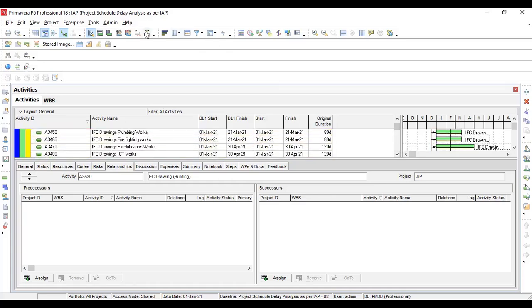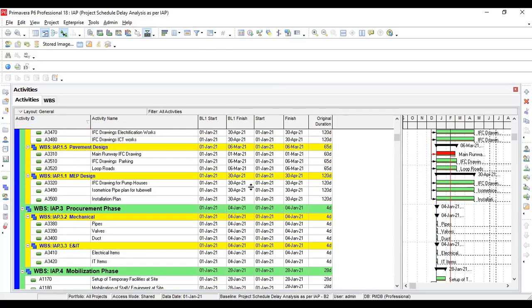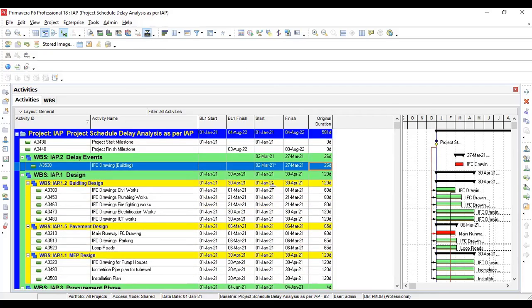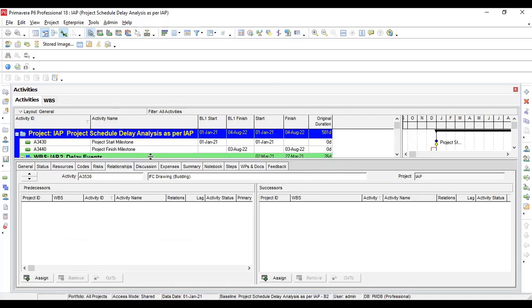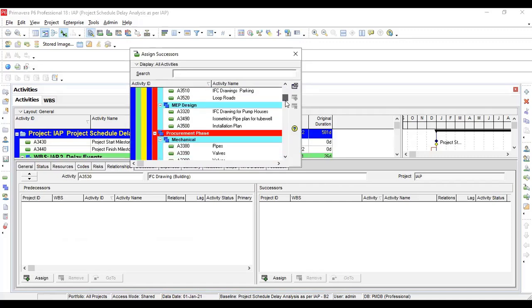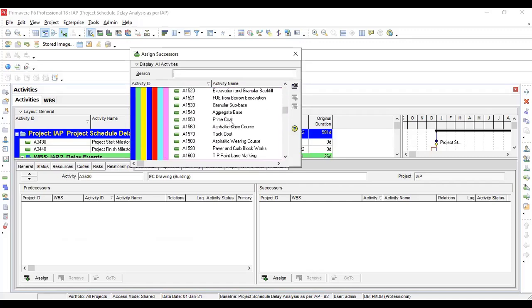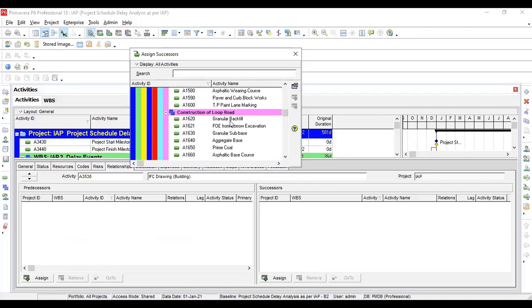Admin building was delayed by this activity, so this should be predecessor. This is a very important point. Again, I will say this should be predecessor. Now we have to go into the successor area.